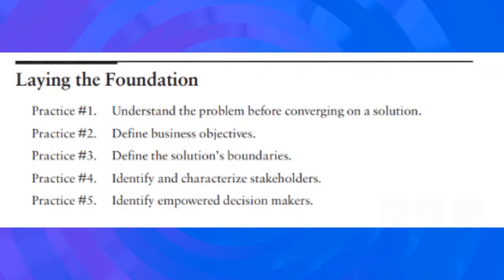Exactly. And it goes to the point that you made about the next principle, which is defining the boundaries. If you have clear business objectives, it becomes very easy for you as an analyst to disqualify a requirement that doesn't fit within those business objectives. And I think the art of knowing how to disqualify a stakeholder ask as a requirement is a key skill that an analyst needs to learn. And to do it elegantly, you need clear business objectives so you can figure out the next principle of defining the solution's boundaries.